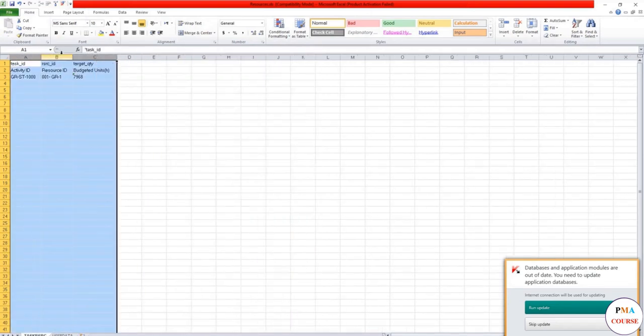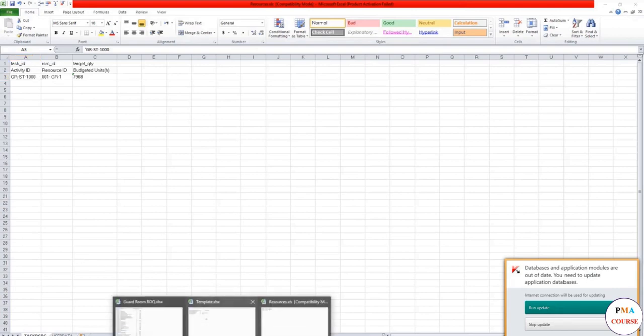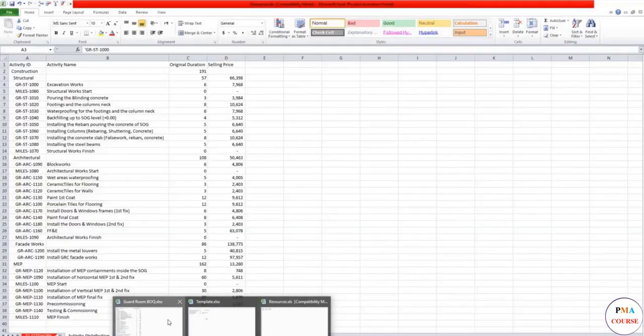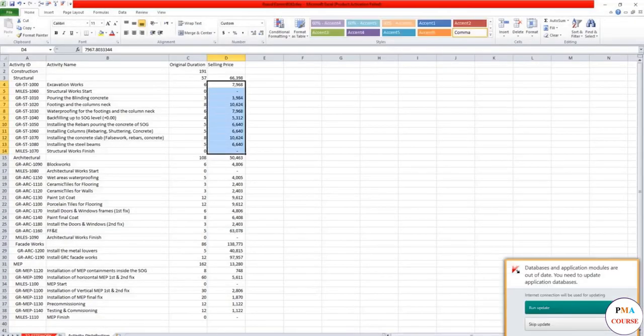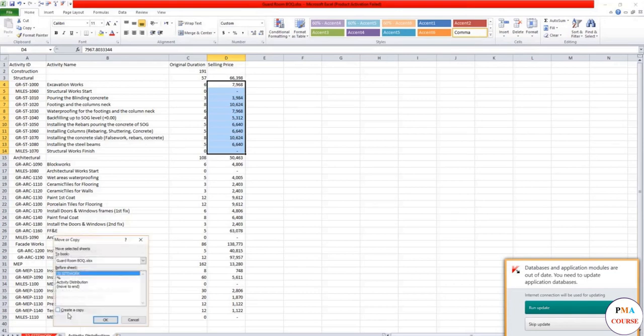It remaining. No need. Budgeted is enough. You can delete all. So it would be only three columns that would make it easier. What you need: the activity ID, the resource ID, and the budgeted units.